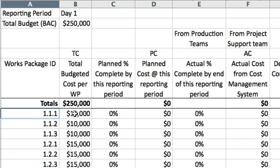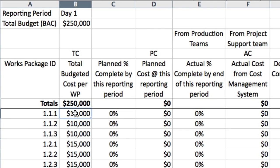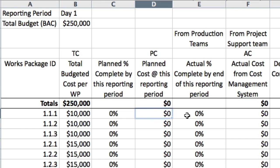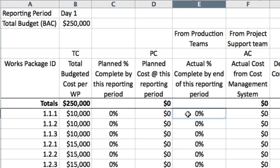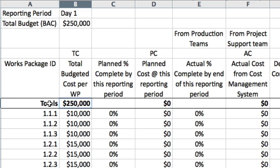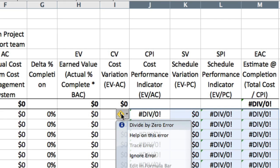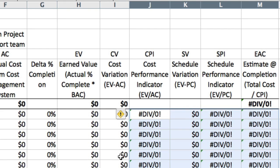The data we can fill in on day one is the works package ID, the budgeted cost for each work package, the planned percentage complete — which on day one will be zero — the planned cost at day one will be zero, and the actual cost on day one will be zero. Cell B6 will be the sum of the individual work package budgets: this is the budget at completion (BAC). Columns J, L, and M contain formulas that divide by zero if a work package has no progress or hasn't started, and Excel flags these as errors. Let's delete all formulas in those cells except for the first work package in row seven.